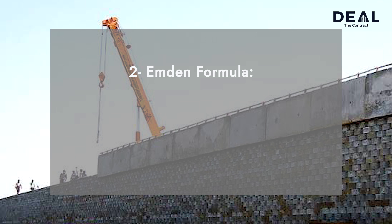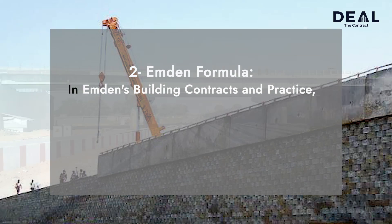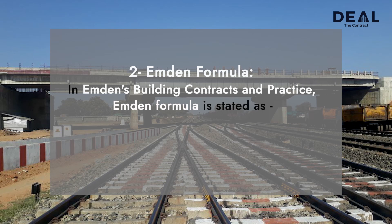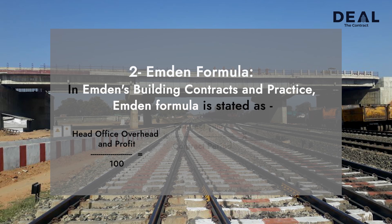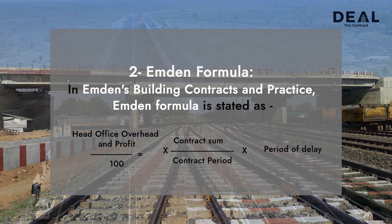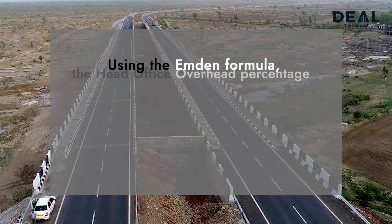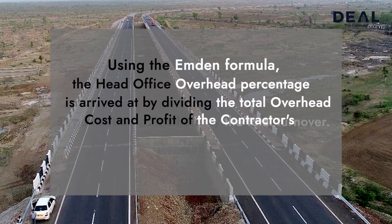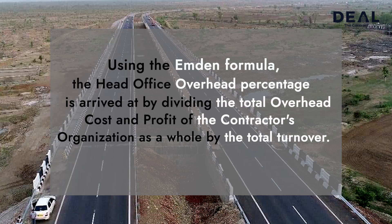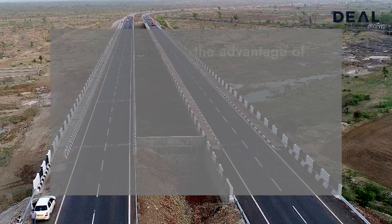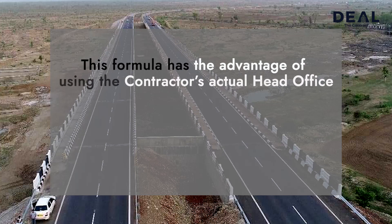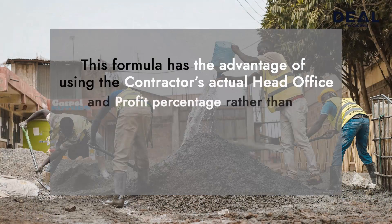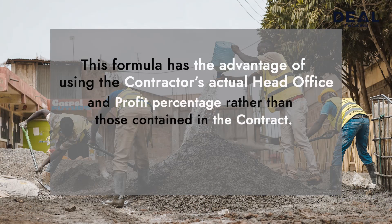2. Emden Formula: In Emden's Building, Contracts and Practice, the Emden Formula is stated as — head office overheads and profit divided by 100, multiplied by contract sum divided by contract period, multiplied by period of delay. Using the Emden Formula, the head office overhead percentage is arrived at by dividing the total overhead cost and profit of the contractor's organization as a whole by total turnover. This formula has the advantage of using the contractor's actual head office overhead and profit percentage rather than those contained in the contract.